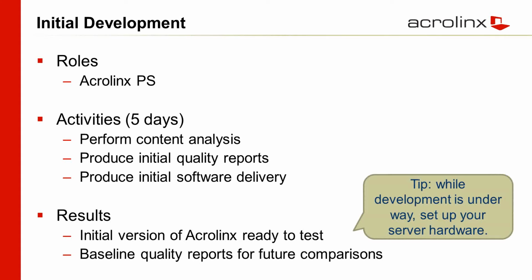Okay, then there's the initial development phase. Actually pretty quick, 5 days is typically how much calendar time this will take. Once the professional services team has your test data, once they understand what the business objectives are, once they've had conversations with your linguistic administrators, they'll perform analysis of that data, they'll produce the initial quality reports, and they'll provide an initial version of Acrolinx that's ready to test.